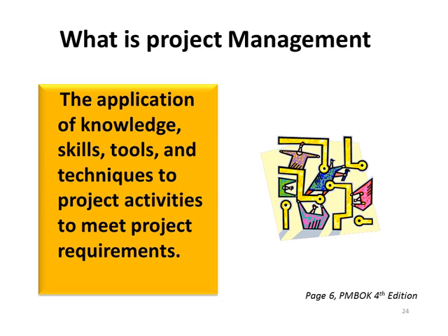What is project management? PMBOK defines it as the application of knowledge, skills, tools, and techniques to project activities to meet project requirements. Project management is accomplished through the appropriate application and integration of the 42 logically grouped project management processes comprising the 5 process groups: initiation, planning, execution, monitoring and controlling, and closing.